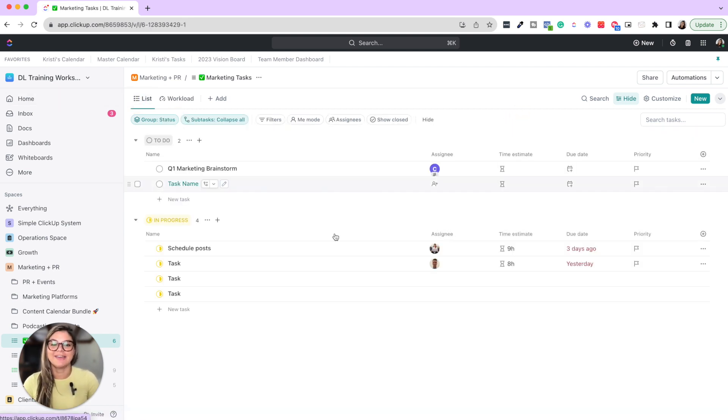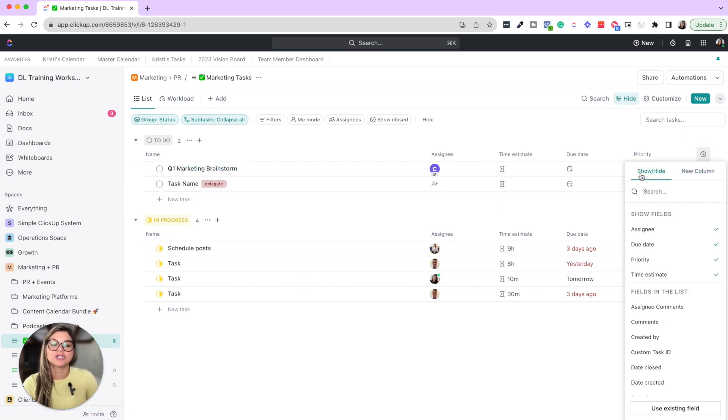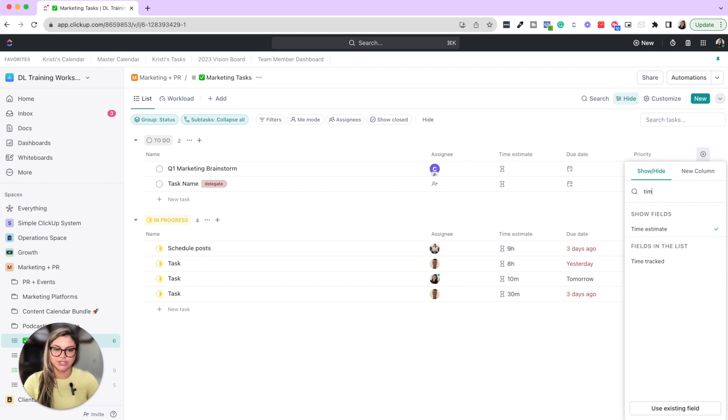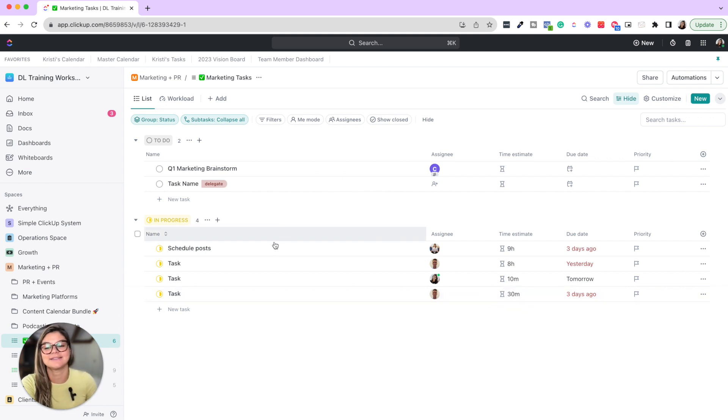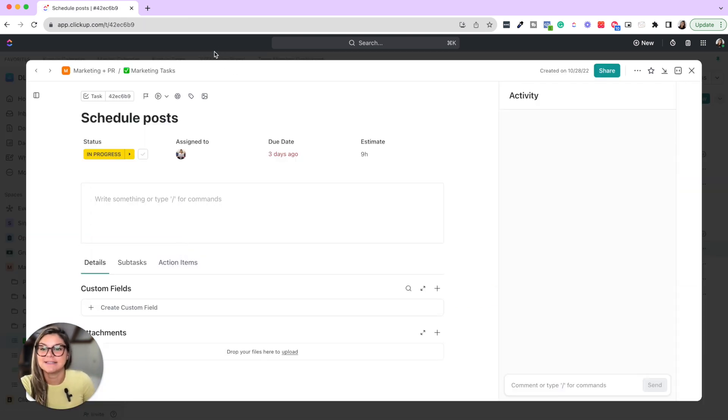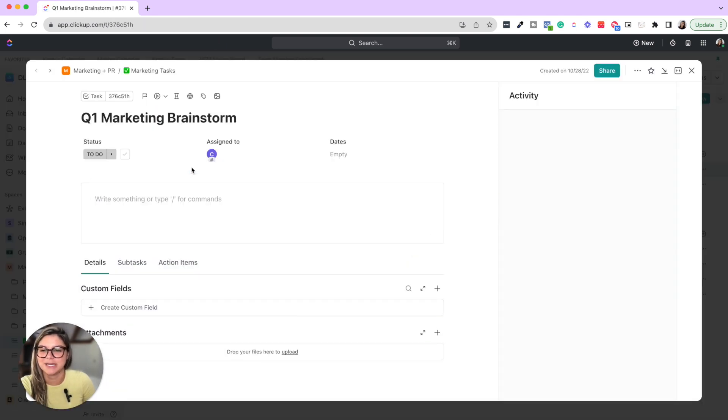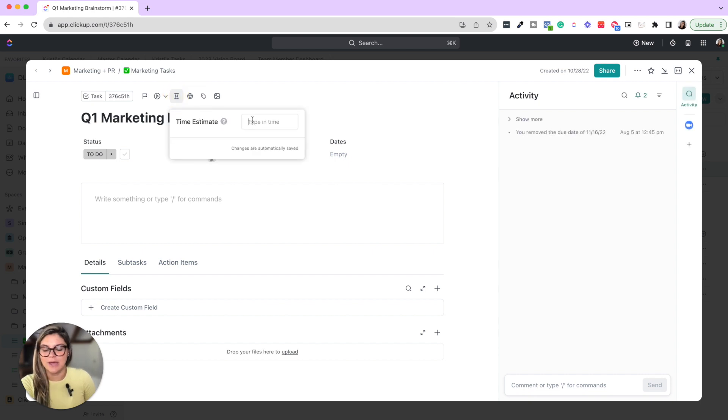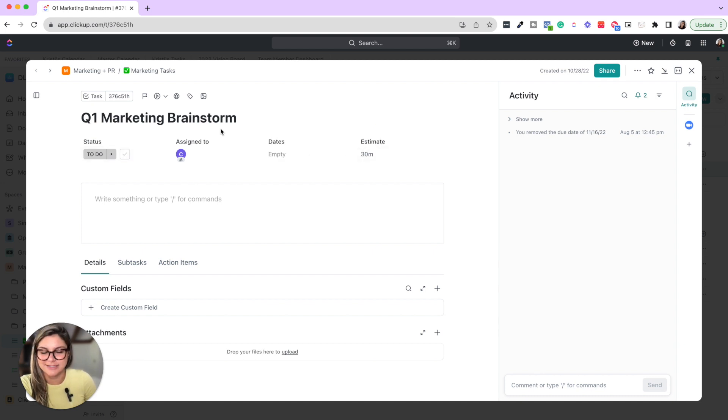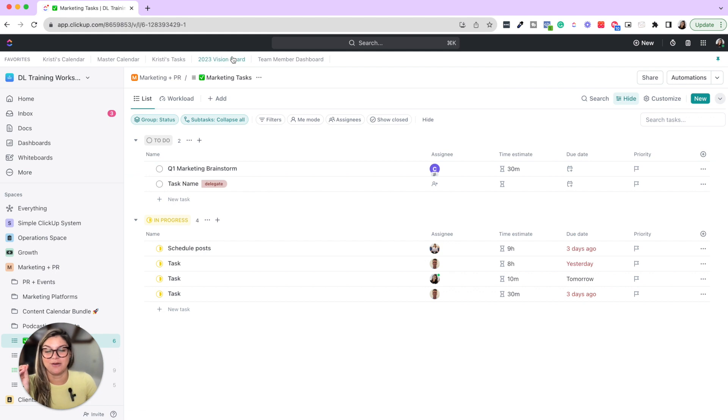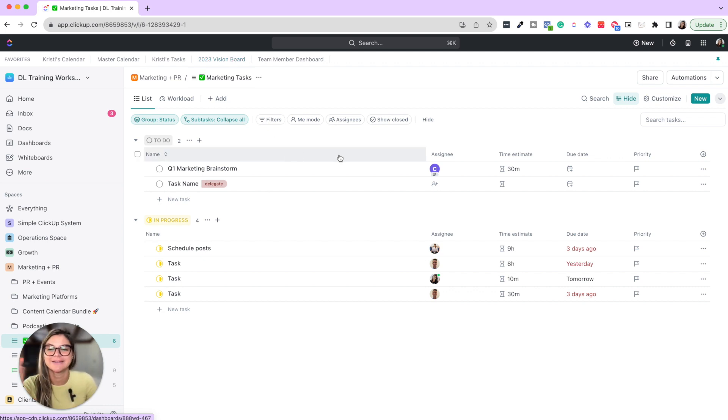If you're using time estimates on your tasks, you'll be able to see Christy has 40 hours capacity for the week. On Monday she has nine hours of tasks assigned out of her eight hour capacity. Jeff has 40 hours and on Wednesday he's approaching capacity at five hours. You can click onto that person on any day and see what those tasks actually are. I really love this view to get that real life look at everyone's workload.